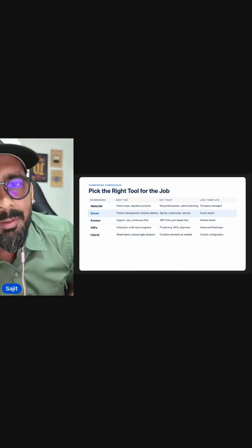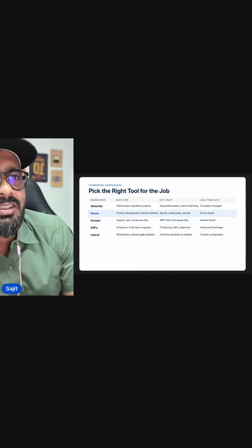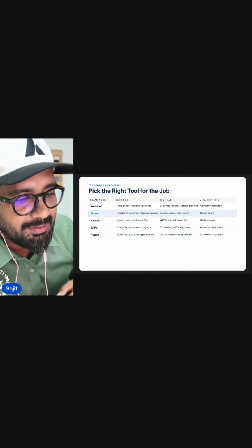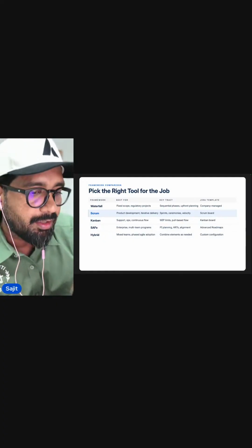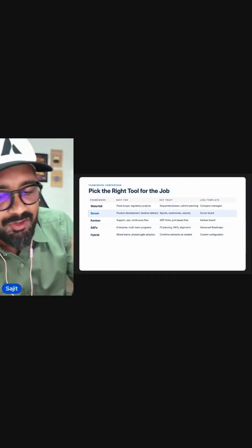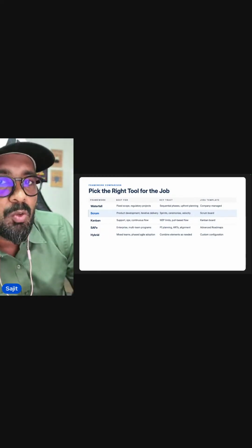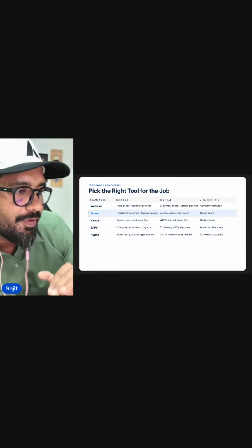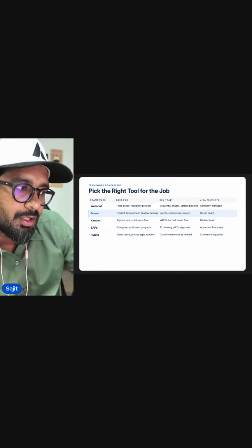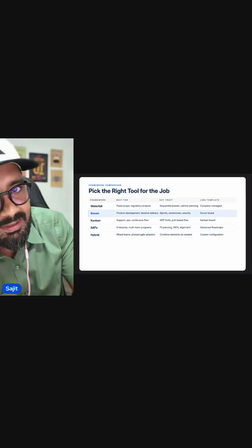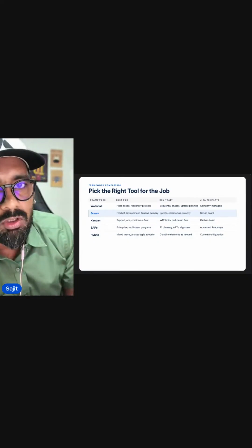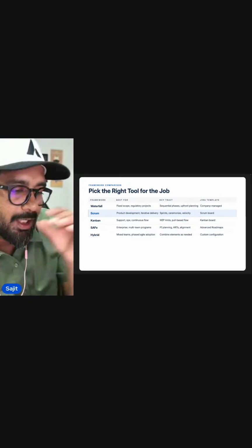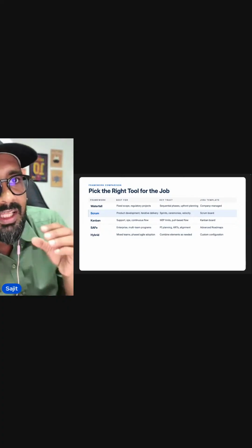All right, let's talk a little bit about Kanban as well. Let's talk first about Kanban, then we'll briefly touch Scrum also. Kanban is specifically better in a model where you're working in a support model, where your ops have a continuous flow. You're not working in sprints. Sprints are time-boxed events of one, two, three, or four weeks where you pick certain requirements, work on them, test them, release them, and pick the next set of requirements. That circle that we just talked about is basically a sprint, right? So that's Scrum.